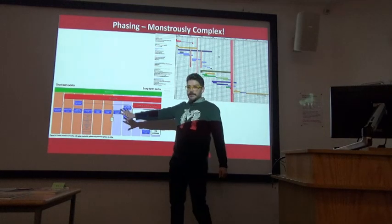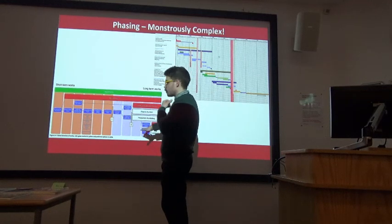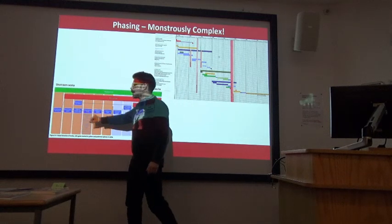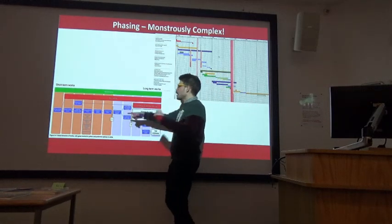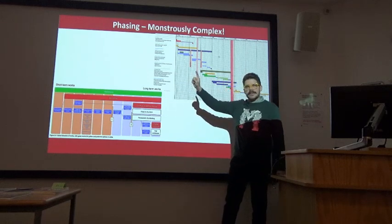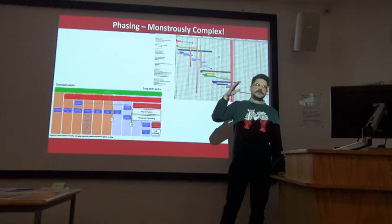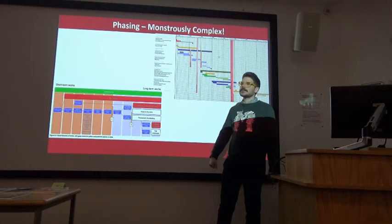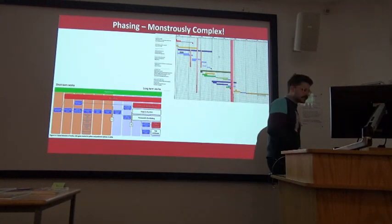This is from engineers Buro Happold, who are a fascinating company. If you look them up, they're world-leading experts in this type of work. We've been working with them very closely, commissioned them to do 2 or 3 pieces of work, and this is their very basic plan. And out of all of these planning scenarios, the one thing that we have been doing is we said, well, we have to explicitly state what will happen if we do nothing. And the answer is the ship will get worse and worse and worse, the operational capacity of the charity will get less and less and less, we will be in a worse and worse position to arrest things getting worse and worse. So you're really making a solid case for funding, but as I say, nothing's guaranteed.